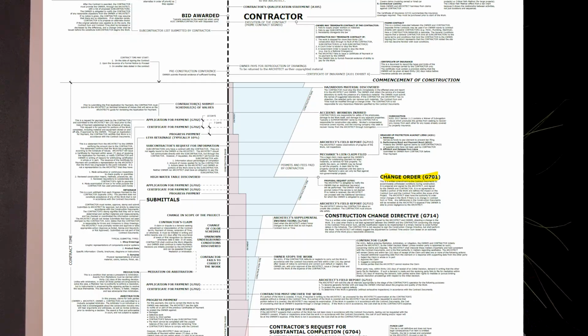Another big one that happens during construction is something called change orders. And this is every client's nightmare. A change order, in a simplified way, is anything that was not accounted for in the timeline or in the budget. Let me give you an example. Let's say we want to build a hotel, and the contractor is going to start digging for the foundation and they find contaminated soil, a soil that you cannot build on top of.